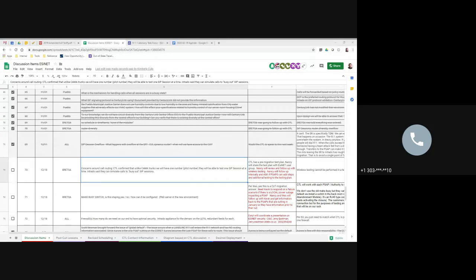Yeah, we were logged into a dispatch position that wasn't being used at that time, and we typed in the star code that we wanted to transfer to. We didn't use the shortcut button, and that's the difference. When we did the migration testing and asked to be transferred to, I can't remember if it was Boulder County or Aurora, the dispatcher used the short code button, and that's where we found the issue.